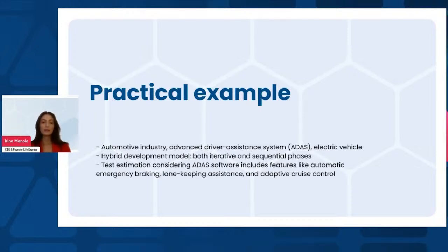Another factor to consider is test context. Testing will be distributed across multiple test centers, including on-road testing in different geographical locations with different time zones, which adds complexity to the coordination and communication efforts.